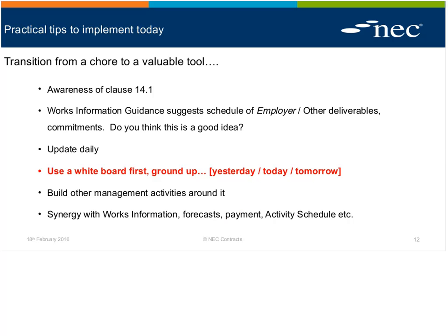But why on earth would you not want to join the dots then? So a little bit more complicated with a bill of quantities for some of these other management activities, but with an activity schedule, it's screaming out synergy. Yeah. And actually, I don't know what you think about this, Rob, but personally, I do forecasts and activity schedule updates. I do them against the program. So it actually creates some columns. Yep. Next to the activity.